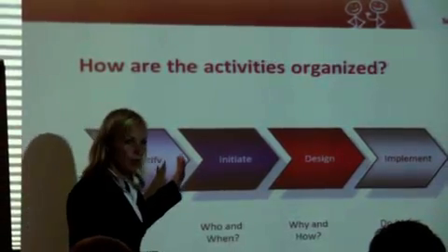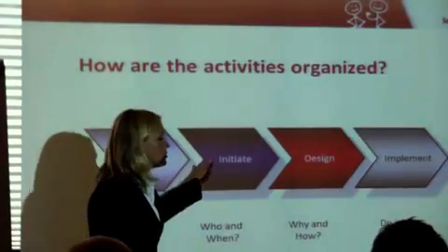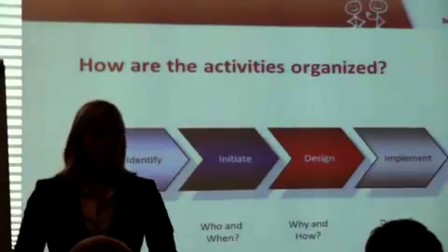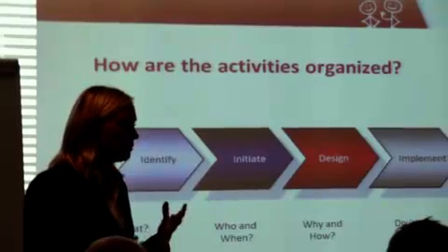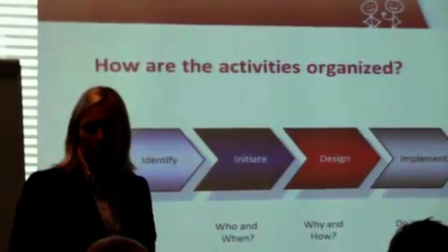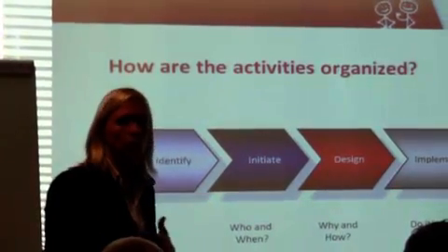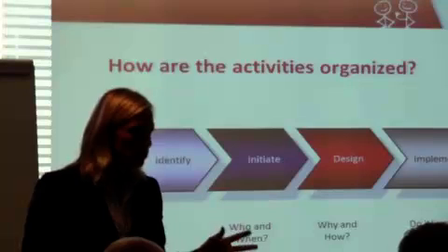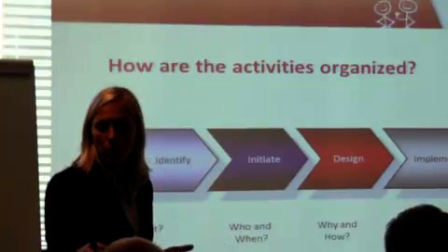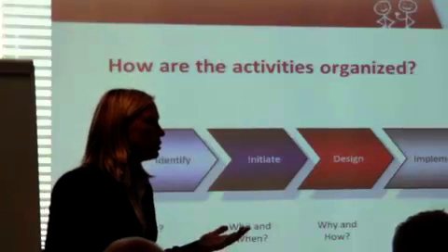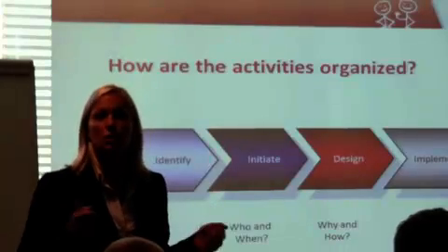When moving into a project and starting to work together with a customer, when we have a signed agreement, we move into what we call the initiate phase, which is sort of ramping up the project together with the customer. It's pretty much the two project managers' phase. They sit together and plan the activities and participation. What kind of people do you need to have present in this workshop and in that workshop? What resources do we have? What time schedule are we working towards? What critical issues do we need to address, etc. It's getting the project started.